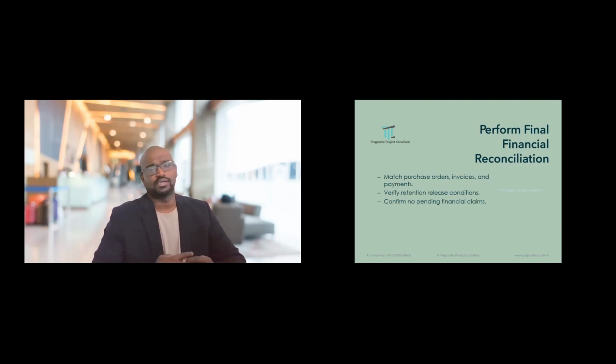Perform final financial reconciliation. So this is going to be very tough because you have to match the purchase orders, you have to match the invoices and payments. Even though we have an ERP system, there will be many mismatches in this area, and this has to be done properly to allocate a proper project cost and expenses. So verify retention releases based on the bank guarantees in the contracts and confirm no pending financial claims from the contract side. So this is a very important stage because this is where the disputes happen.